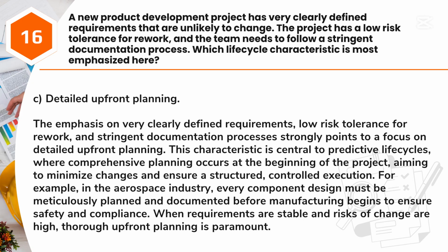Answer: C. Detailed upfront planning. The emphasis on very clearly defined requirements, low risk tolerance for rework, and stringent documentation processes strongly points to a focus on detailed upfront planning. This characteristic is central to predictive life cycles, where comprehensive planning occurs at the beginning of the project, aiming to minimize changes and ensure a structured, controlled execution.